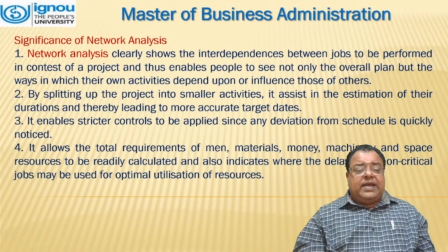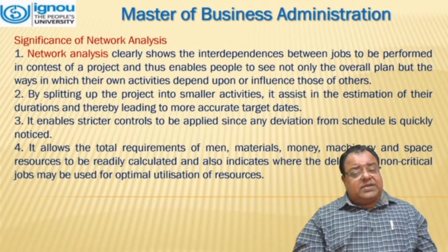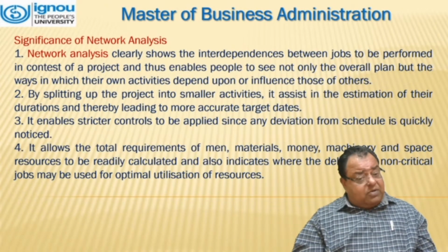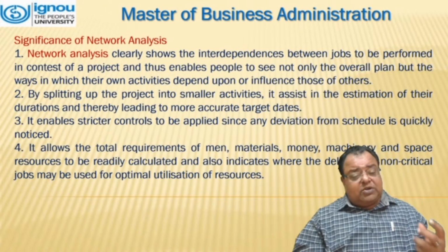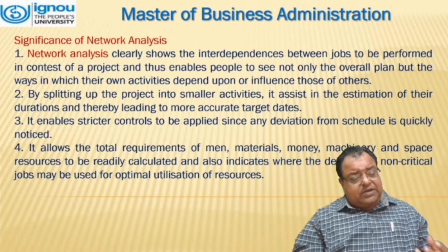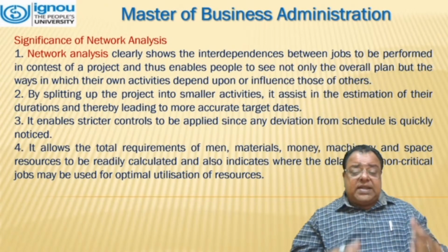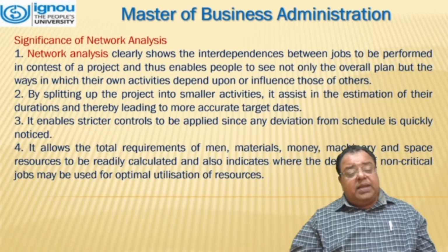Secondly, by splitting up the project into smaller activities, it consists in the estimation of their durations and thereby leads to more accurate targets. Thirdly, it enables stricter control to be applied since any deviation from the schedule is quickly noticed. And lastly, it allows the total requirement of man, material, machinery, and space resources to be readily calculated and also indicates where the delay of non-critical jobs may be used for optimum utilization of resources.